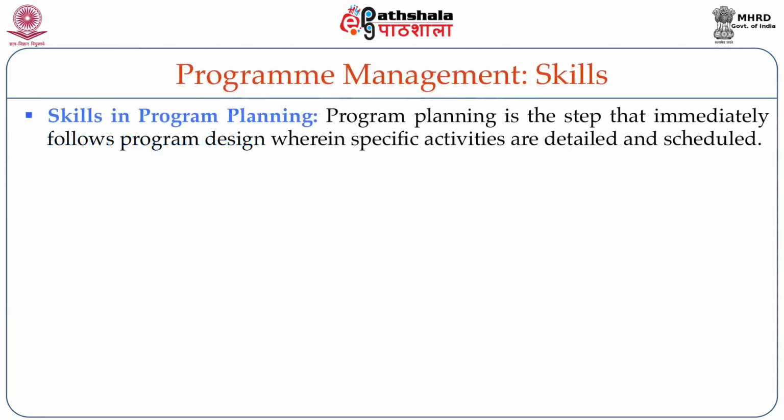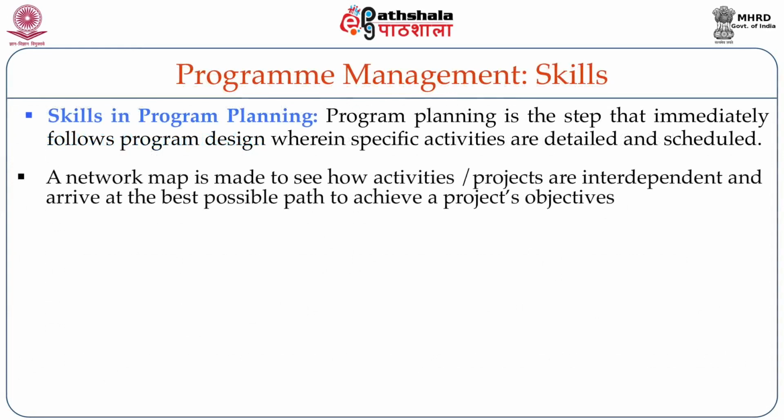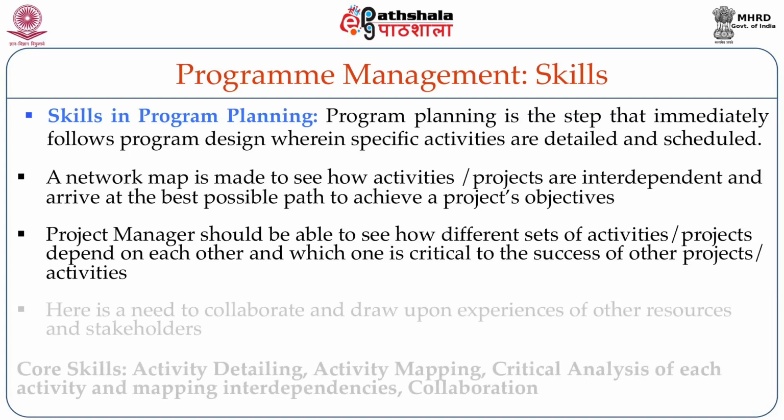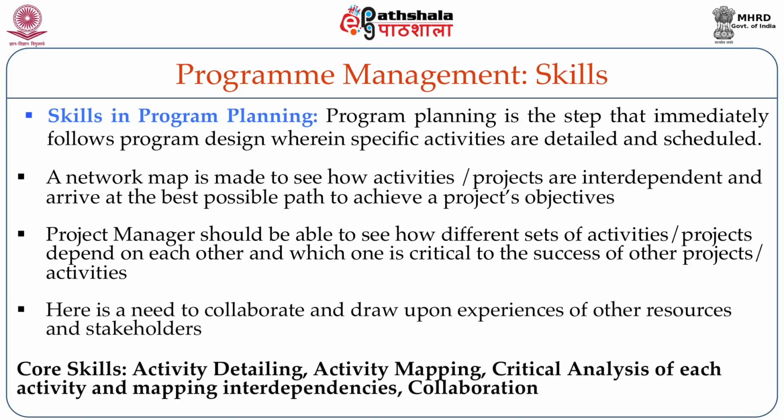What are the skills in program planning? A network map is made to see how activities and projects are interdependent and arrive at the best possible path to achieve a project's objectives. So the project manager should be able to see how different sets of activities and projects depend on each other and which one is critical to the success of the other projects. So there is a need to collaborate and draw upon experiences of the stakeholders of the other projects. So what are the core skills required?